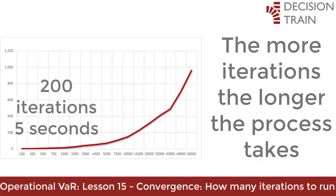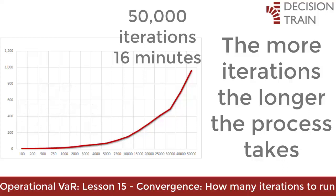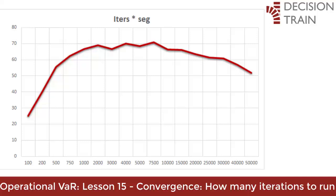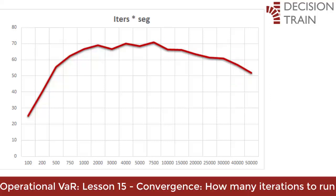Generating 200 iterations — the maximum limit in the free version of DT simulator — will only take 5 seconds on my computer for this particular model. 50,000 iterations will take more than 16 minutes. In terms of iterations per second, it seems that an optimum is reached around 2,000 to 8,000 iterations, at which the simulation process runs around 70 iterations per second. After this threshold, the process becomes less efficient as difficulties in storing and handling large amounts of data affect Excel.